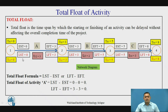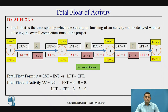Let's see the example of activity A. The latest starting time of activity A is 0 and the earliest starting time is 0, so 0 minus 0 gives 0. The latest finishing time is 3 and the earliest finishing time is 3, so 3 minus 3 is also 0. A total float of 0 means activity A is a critical activity. If the total float is more than 0, then the activity is non-critical.